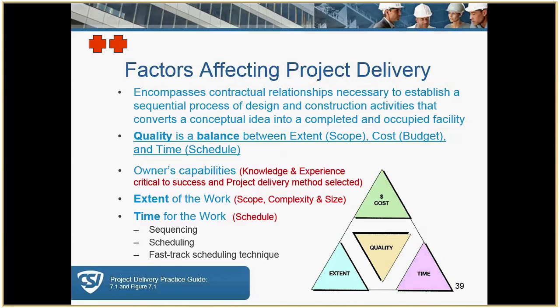The time, the extent of work, the scope, the complexity. The time is, I'd like to emphasize, because this is, I think, where we all seem to end up lately, that everybody wants something done in a short amount of time, and that affects cost, because, of course, now you have people having to work on hours that are not probably traditional, and that meaning more so the contractor than the rest of us.